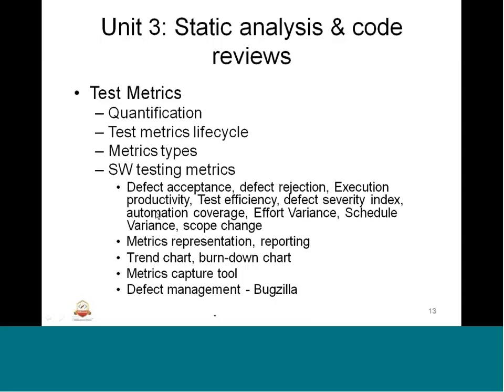Metric representation, how they are being reported on a daily basis, weekly basis, and trend charts, how they are shown to the higher management of the customers. It's a burn down chart. Suppose the next set of activities is going to take 1 month, and how are you going to reach that 1 month? Using the burn down chart, we are going to predict and report, and as we progress we are going to update it and report it.